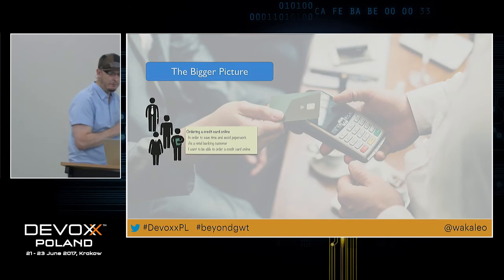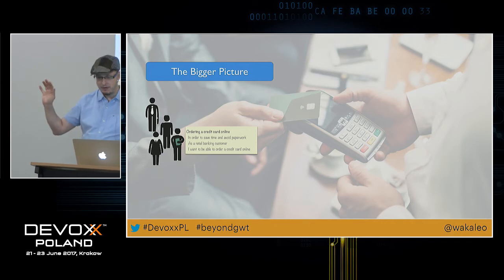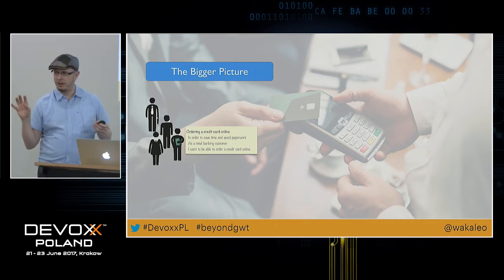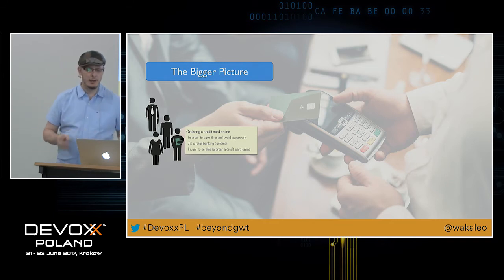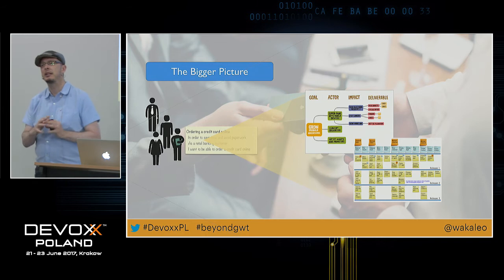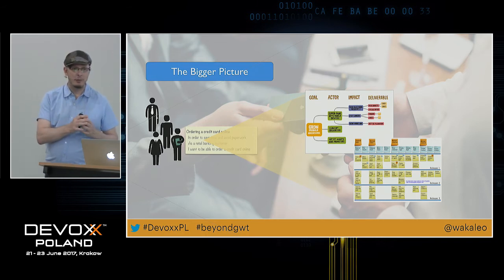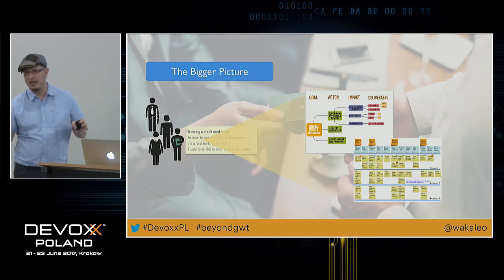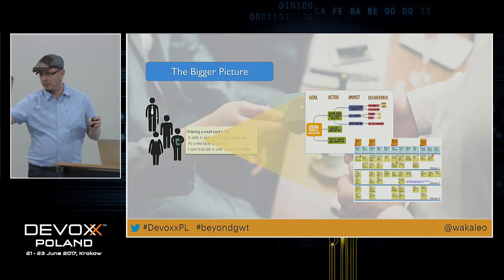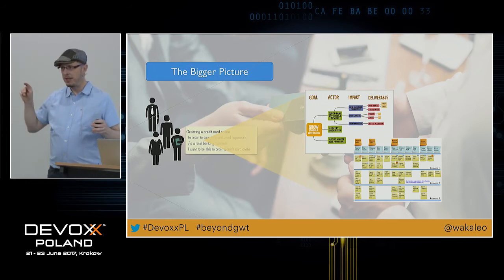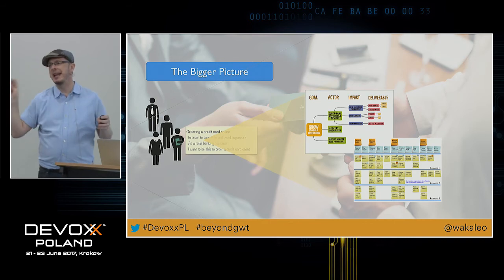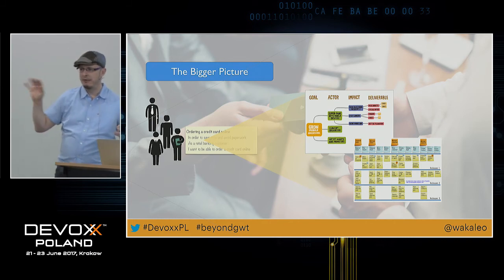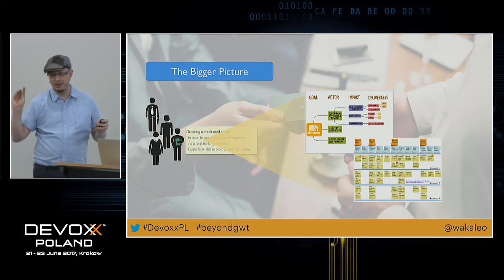But since it's a fairly big one, typically at an epic level or at a whole application level, we're typically going to start by looking at the large picture. I'm not sure whether anyone's ever done techniques like impact mapping or event storming. This is the time when you do that. Has anyone done impact mapping? Impact mapping is basically a mind mapping way of going from a business goal and figuring out what capabilities could possibly deliver that business goal and why and how likely they are to work and what the underlying assumptions are.